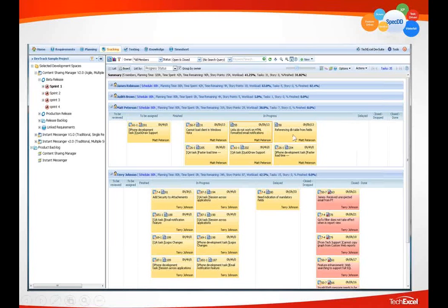Every single development task needs to be tested. We do not really care too much about your estimate for testing. And it's almost impossible anyway on day 1 to estimate all the QA testing effort. But it's absolutely possible, and absolutely needed, to estimate all the time remaining for the driving effort, for the implementation by the programmers and other owners who are creating the working software.